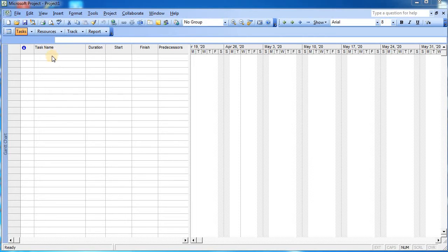So what we have done, we have divided the complete project into various sub tasks. A major project is divided into 2 parts: substructure and superstructure. Under substructure there are various steps, as well as under superstructure there are various activities. We have broken the work such that it appears in a logical sequence. That means after completing the substructure work, then only we can move ahead for superstructure work.